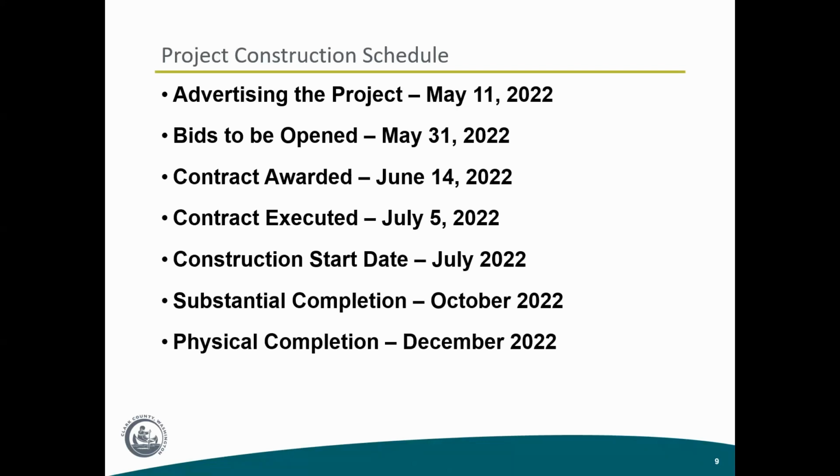One common question that we get is the hours of operation that the contractor will be working. Our specifications for this project state that the contractor can be out there Monday through Friday, 7 a.m. to 5 p.m. However, depending on the situation, work may start a little earlier or run a little late, but that would be on isolated conditions. For the most part, it will be Monday through Friday, 7 a.m. to 5 p.m.